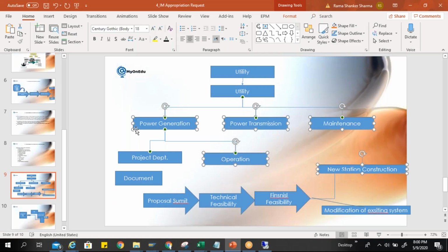If you want to add more here, in that case you need to assign the multiple measures to the appropriation request. It is just like one idea, and you are executing it in multiple projects. For example, if you are going for an ERP implementation project, a SAP project implementation. The proposal is one: SAP implementation is one proposal, one idea. But when we go to implement it, I can divide it into three options.